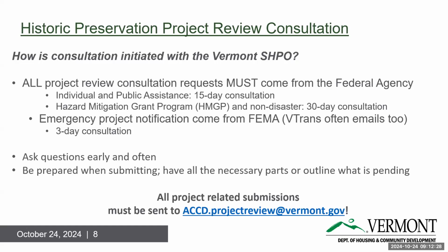And then, of course, emergency project notifications need to come from FEMA, but I do want to give a shout out that VTrans very often sends us notification as well when emergencies are being declared and they need to go work on a particular bridge or road or culvert. And those, when we get the paperwork, we have a 3-day consultation. So we've got to turn things around pretty fast.